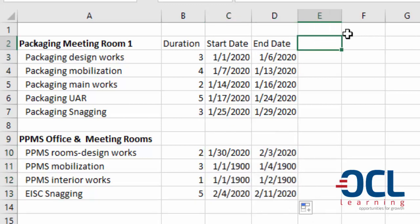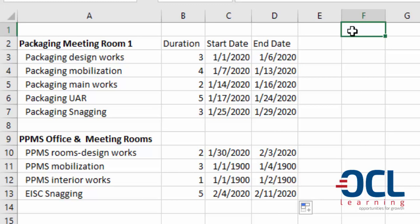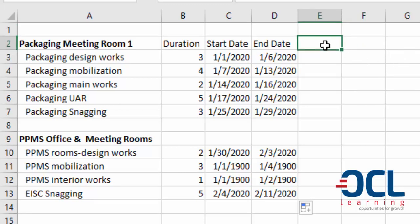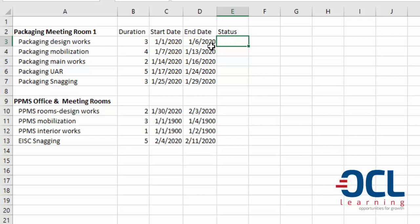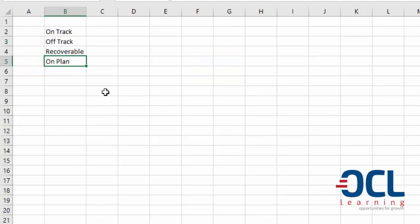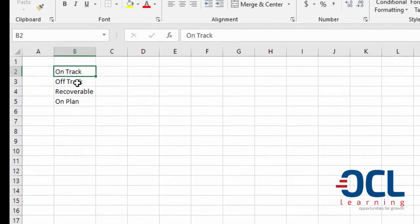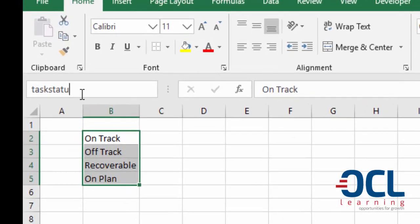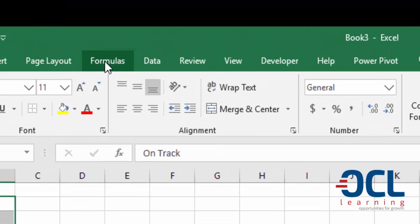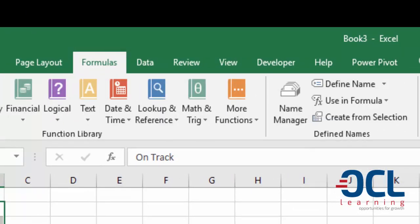Next is to use a combination of data validation and conditional formatting to color cells on the Gantt chart based on project status. We include the status of each task. The project status options on another sheet are: on track, off track, recoverable, and on plan. I'll give this a name and call it 'task status' in the Name Box then press Enter. You can also define names by going to Formulas then Define Name.